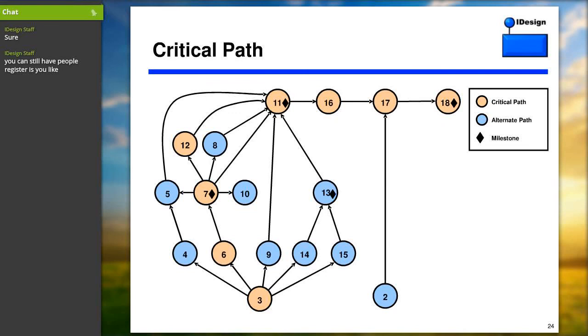It's not as if you take all the services, estimate the effort for every single one of them, sum it all up, and divide by the number of developers, and that's how long it will take. That's complete nonsense. That's like saying 9 women can produce 1 baby in 1 month. That's absolutely not true. The only way to answer that question is doing critical path analysis.